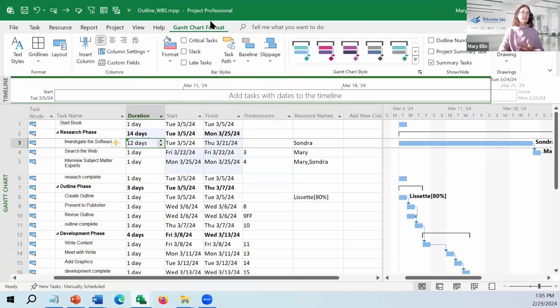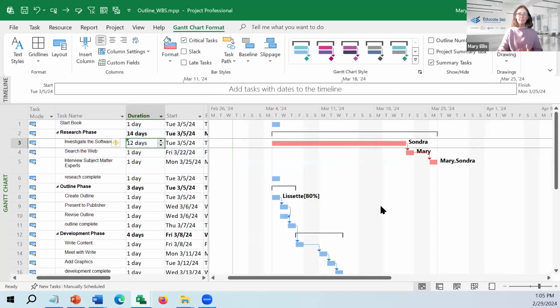So we use the project tool because the views are built for us. The Gantt chart can show us immediately what's on the critical path. Critical path means if someone says this project has to finish sooner, then I'm going to look to Sandra and go, is there any way we can do that faster? And Sandra might go, no, Mary, you're kidding me. And I go, great, thank you. Do your work. I'll talk to upper management and let them know, nope, this is the timeline we're on.